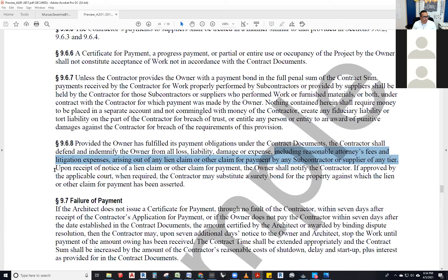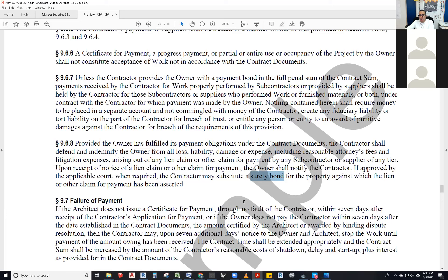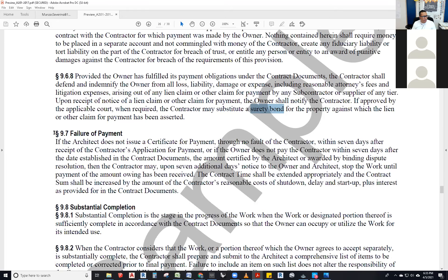Upon receipt of notice of a lien claim, the owner shall notify the contractor. If approved by the applicable court when required, the contractor may substitute a surety bond — an insurance bond that covers the contract amount — for the property against which the lien has been asserted. It's essentially saying: here is this bond that will cover what you're owed, so let go of this property that belongs to the owner. That's kind of how it works, so now we go to section 9.7, failure of payment.